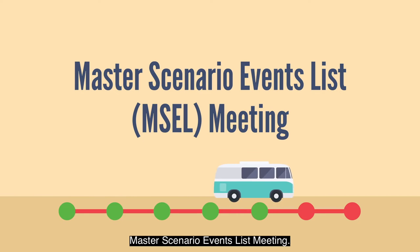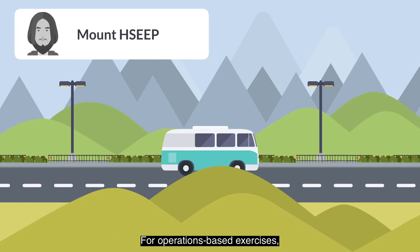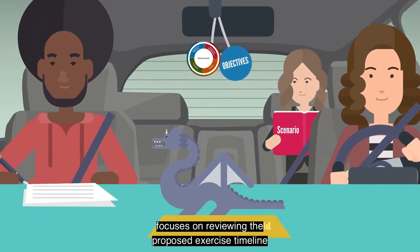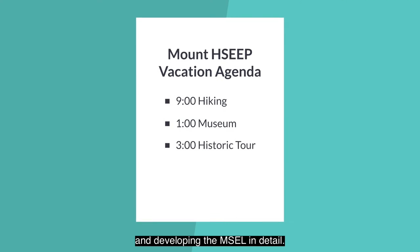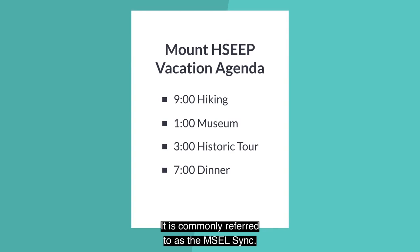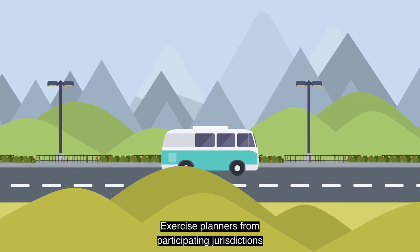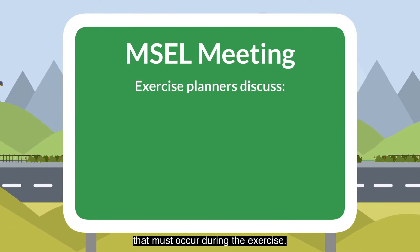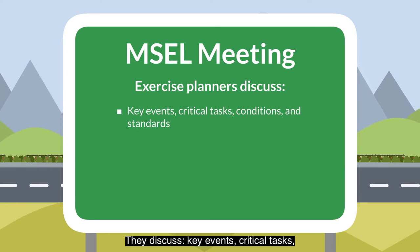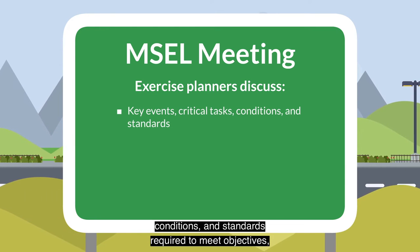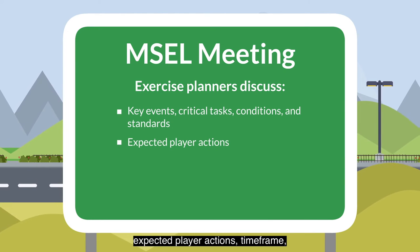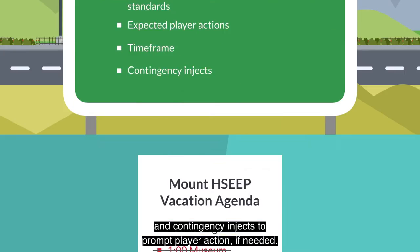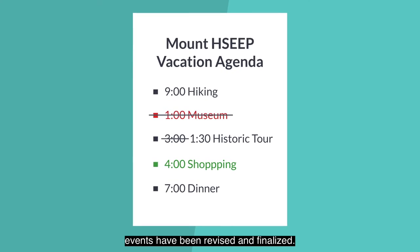For operations-based exercises, the master scenario events list, or MSEL, meeting focuses on reviewing the proposed exercise timeline and developing the MSEL in detail. It is commonly referred to as the MSEL sync. Exercise planners from participating jurisdictions or organizations are included to identify activities that must occur during the exercise. They discuss key events, critical tasks, conditions, and standards required to meet objectives, expected player actions, time frame, and contingency injects to prompt player action if needed. At the end of the MSEL meeting, events have been revised and finalized.